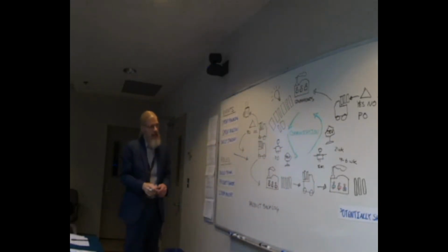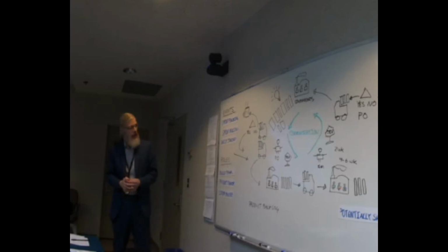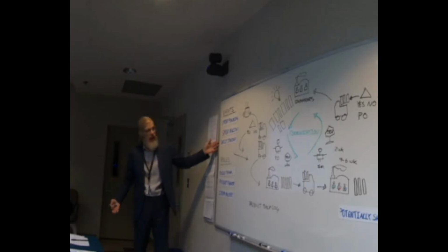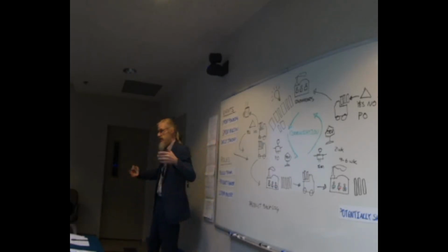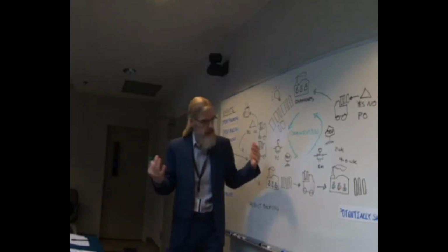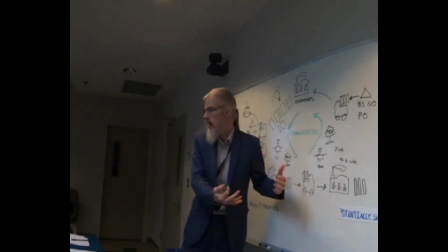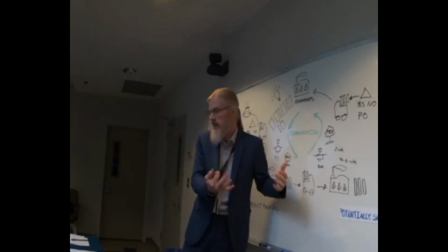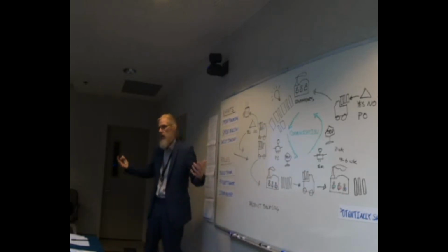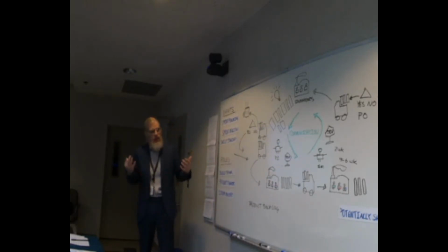We talk about communication saturation. That is to say that a lot of these events really help us be transparent. The daily stand-up, this is every single day. The team comes together and says, this is what I'm working on. I have a problem, I have an impediment. I can't meet my commitment to the sprint because my laptop died or whatever. It's raising these things so that we don't lose days, we lose hours maybe.